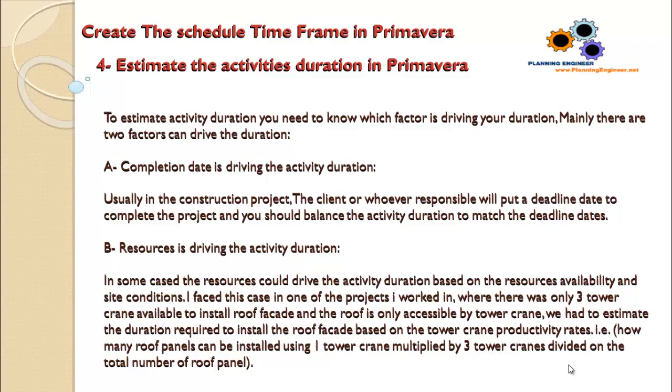I faced this case in one of the projects I worked in, where there were only three tower cranes available to install the roof facade, and the roof was only accessible by tower crane. We had to estimate the duration required to install the roof facade based on the tower crane productivity rates.